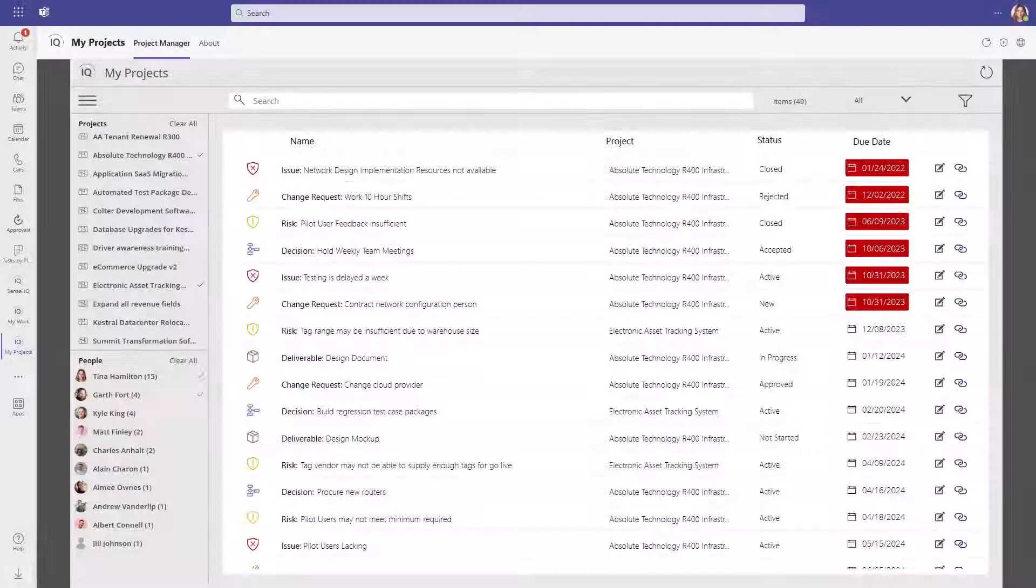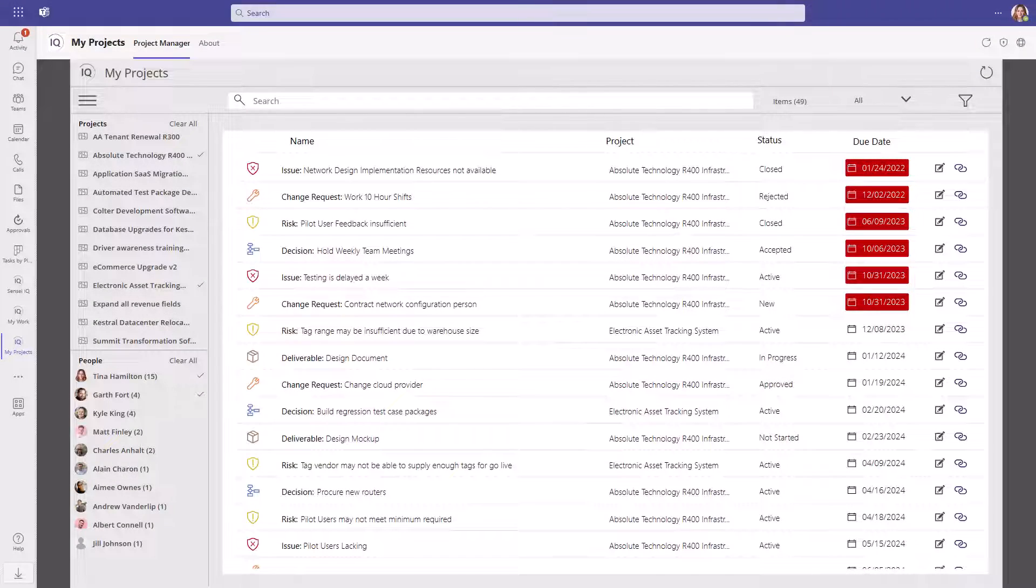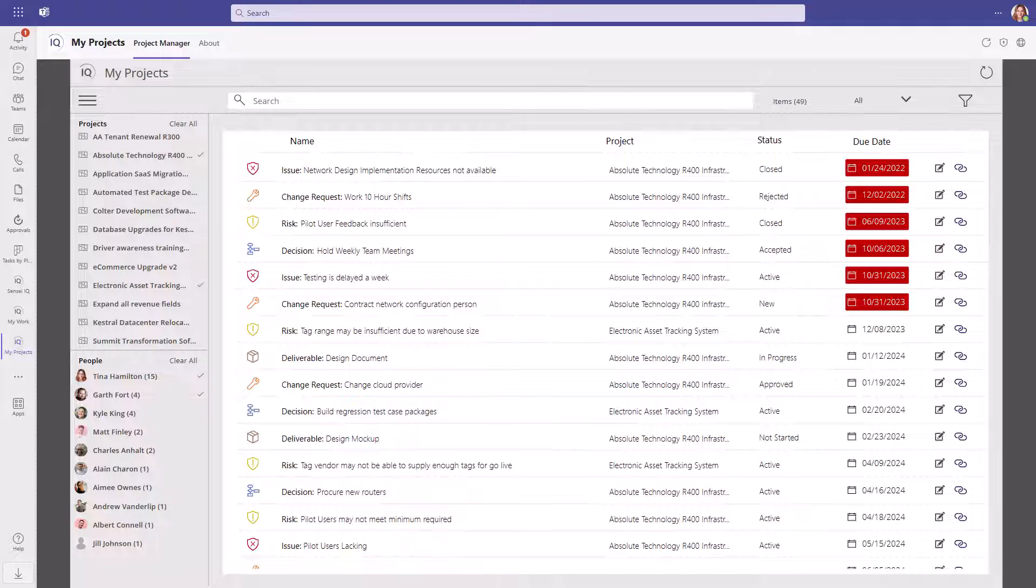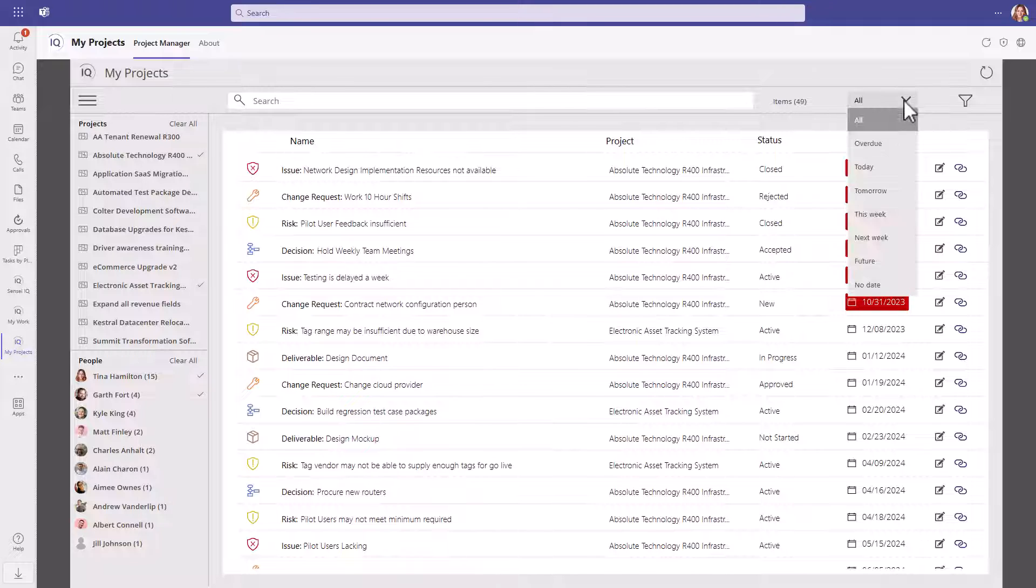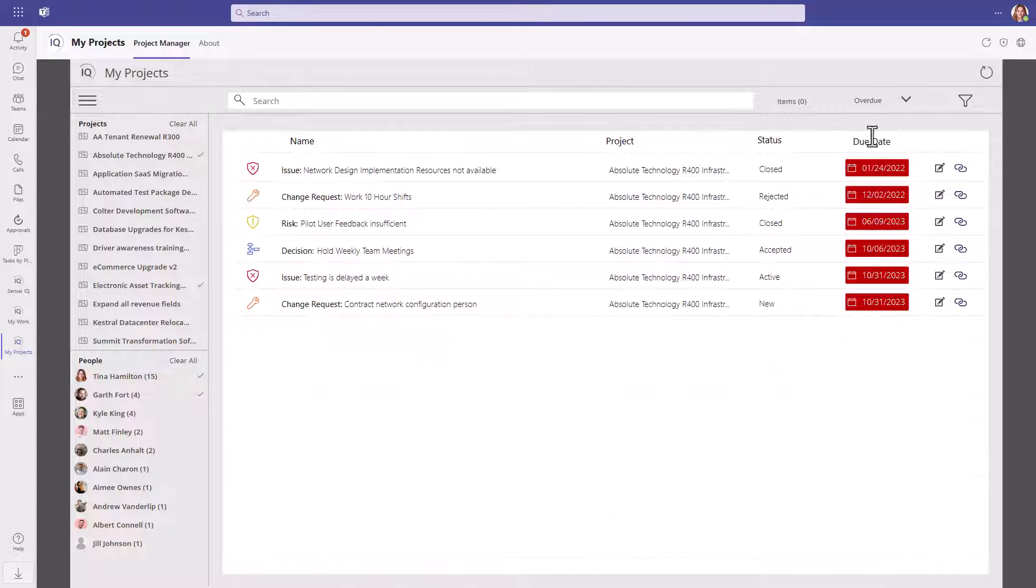We can also look at activities by date: today, tomorrow, this week, next week, into the future, and overdue tasks. When you click on the date drop-down and select overdue, there are six overdue activities across two projects selected.